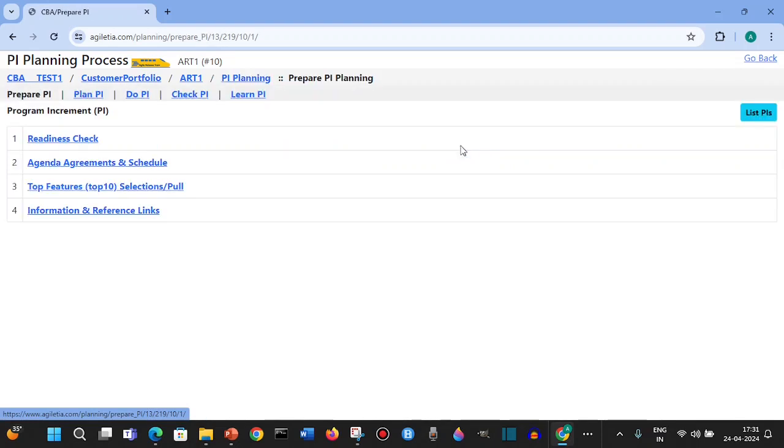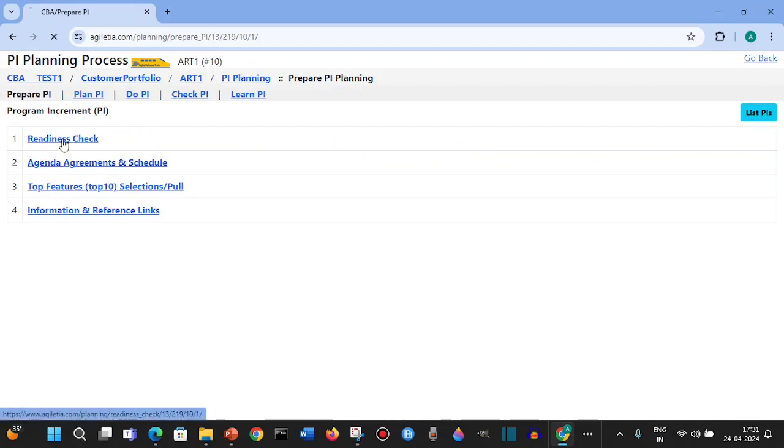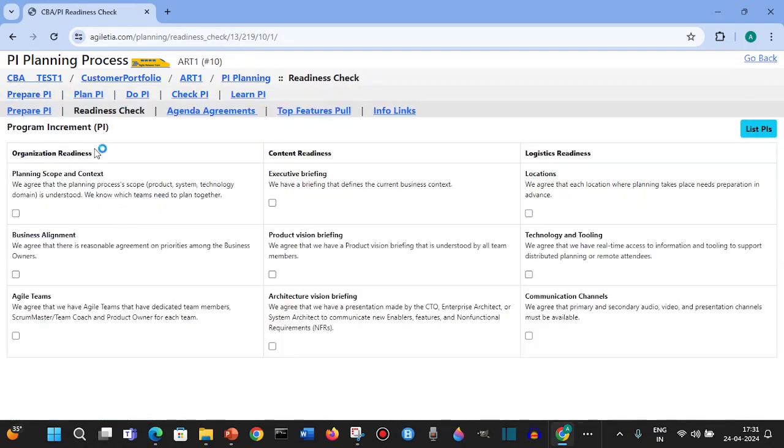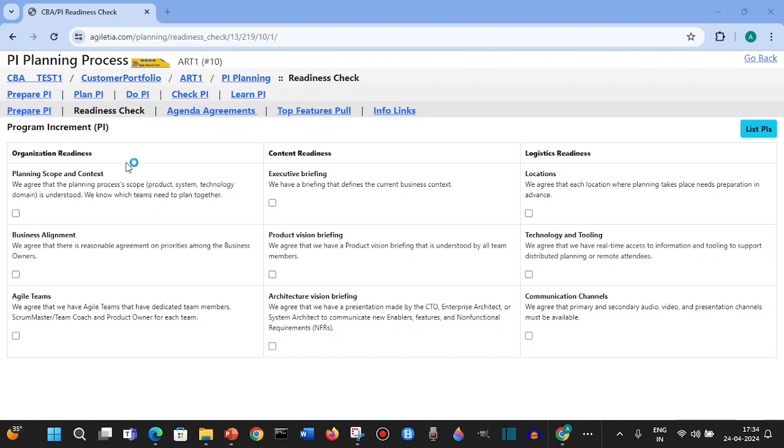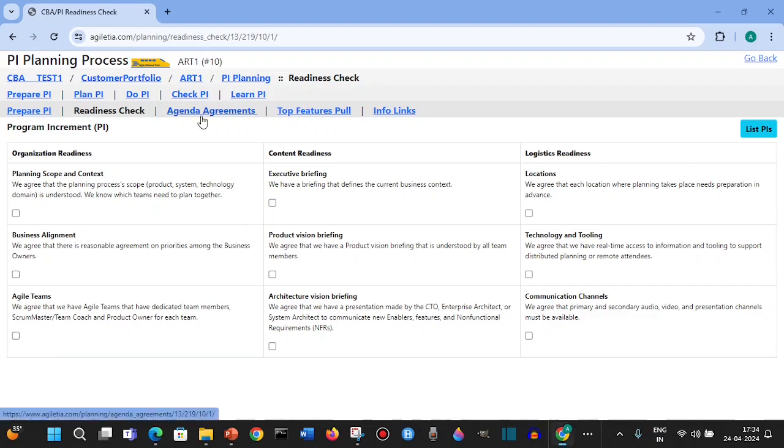In prepare you will have the readiness check and the agenda. The readiness check will have organization, content, and logistics. This is as a readiness check for the PI - this is a preparation part. We have organization, content, and logistic readiness. We need to check all these details and make sure it is ready for the PI.